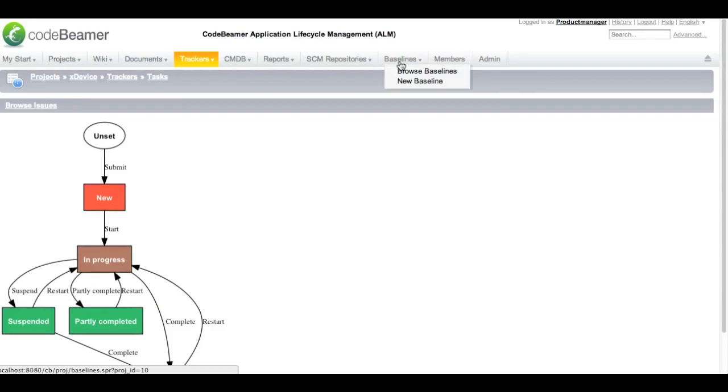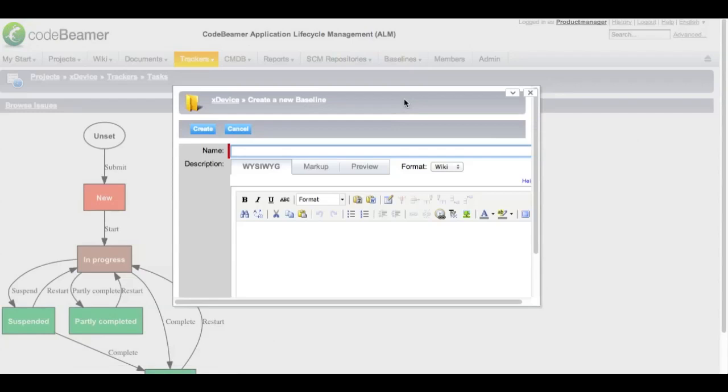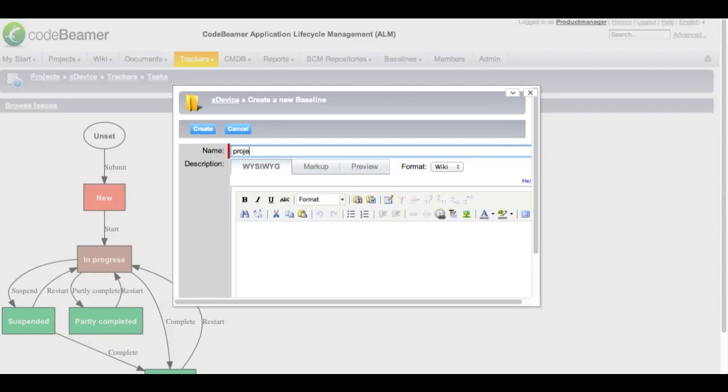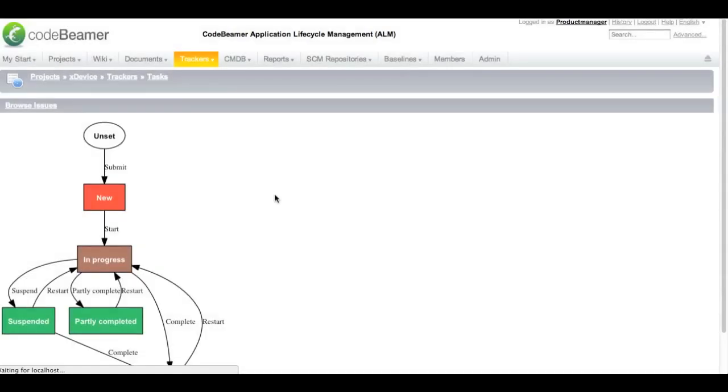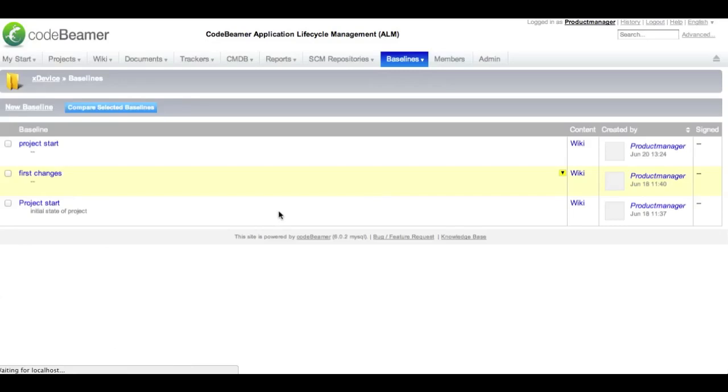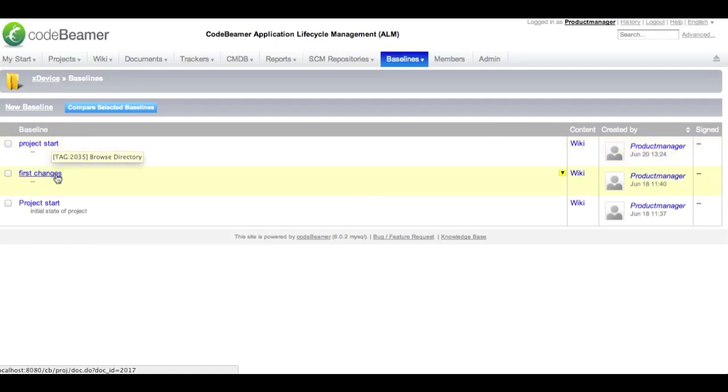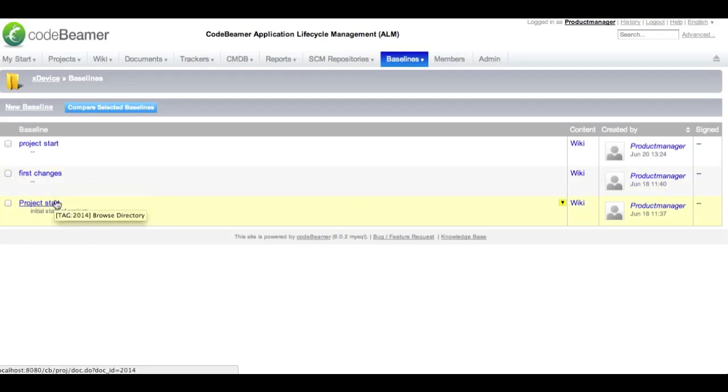Whenever you have finished the release you want to draw a baseline. A baseline freezes the status of your project to a certain point in time. This includes documents, wiki sections, trackers and interdependencies between them. We call this baseline project start. Baselines are very important for the full traceability of your project. Each baseline lets you jump back in time to see what the project was in, what status it was in at that certain point in time.